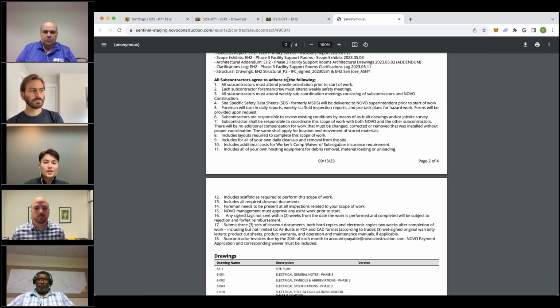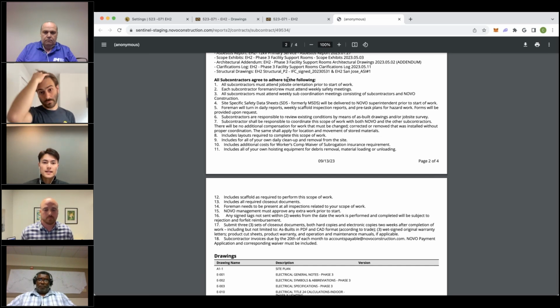That's awesome. And we're glad to see the versatility of APIs being leveraged across Sentinel. And I guess, are you looking to build any new integrations in the future? If so, what do you think these integrations could look like with Fieldwire? I think the one we want to touch on next is taking our completed RFIs and submittals and auto pushing those out to the relevant project in Fieldwire, so then people can start linking those documents directly in their drawings. That also gives the project team outside of our project management software access to that finished PDF with all the information of the submittal or the RFI.